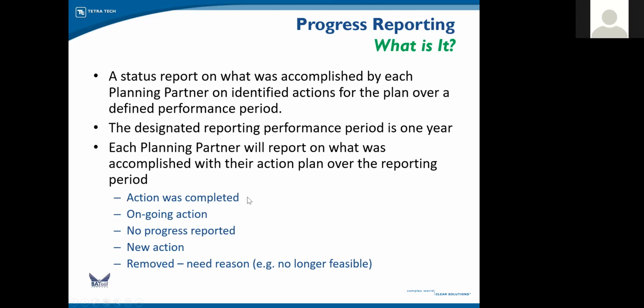Even if an action is completed, you still need to update that progress every year. So in your first year, if you've completed an action, you still need to update that. The reason being is that if for some reason you decide to go back in and do some work on it, you have the ability to open it back up and do that work, and you can add to that. So in other words, if you receive extra funding or something like that, you can add to that work.